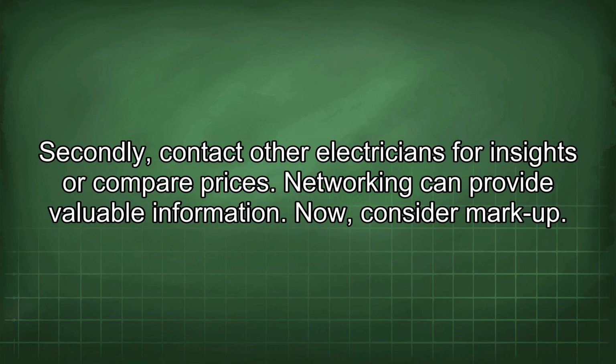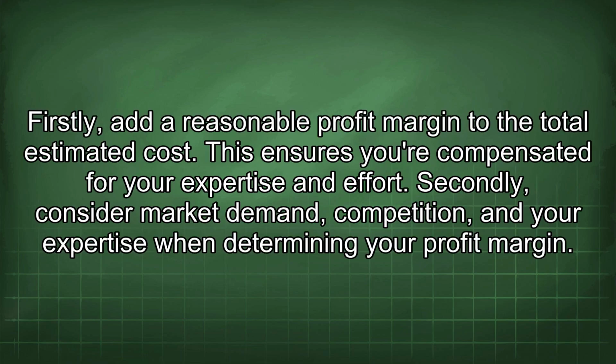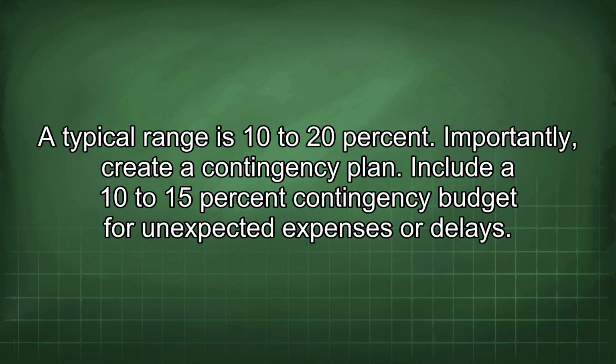Now, consider markup. Firstly, add a reasonable profit margin to the total estimated cost. This ensures you're compensated for your expertise and effort. Secondly, consider market demand, competition, and your expertise when determining your profit margin. A typical range is 10 to 20%.